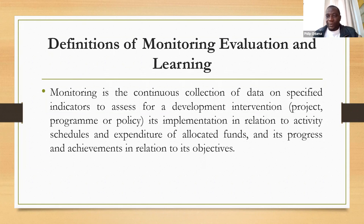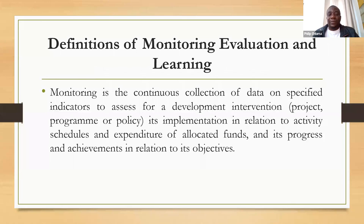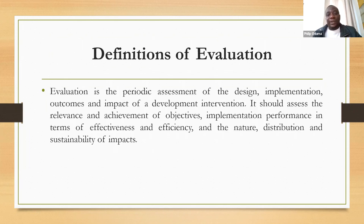You can also monitor implementation in relation to activity schedules and expenditure — for example, we were supposed to have spent this amount of money by this period, so how much have we spent and have we spent it within the intended period? Monitoring is continuous — you can do it every single day, monitoring a specific aspect of the project. But when you come to evaluation, evaluation is periodic. Evaluation starts even before implementation begins, while monitoring starts after implementation begins.